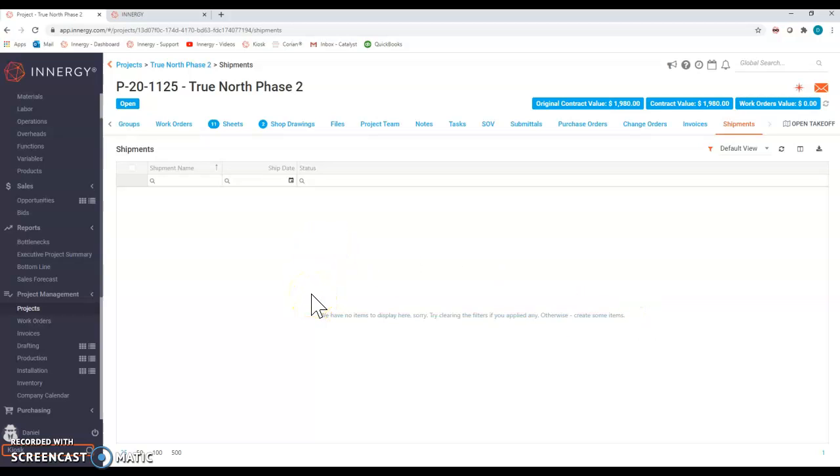If I go out to the shop and say, hey, ship work orders 2, 3, and 4, they'll just grab everything that is 2, 3, and 4. They may not know exactly what items are part of 2, 3, and 4, and there's nothing on the shipping ticket that says this hasn't shipped yet. There's nothing that flags it as back ordered.